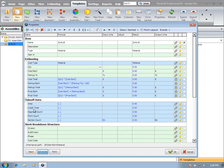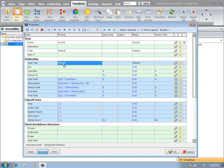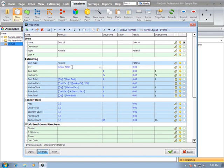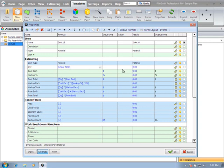I'm going to, for this example, at least just do the 2x4x16 based on a linear total. If I left click on linear total, drag my mouse up into quantity, release the mouse. You'll see it populated linear total. So that right now is just going to use whatever linear item this is applied to. It's going to display the linear footage.